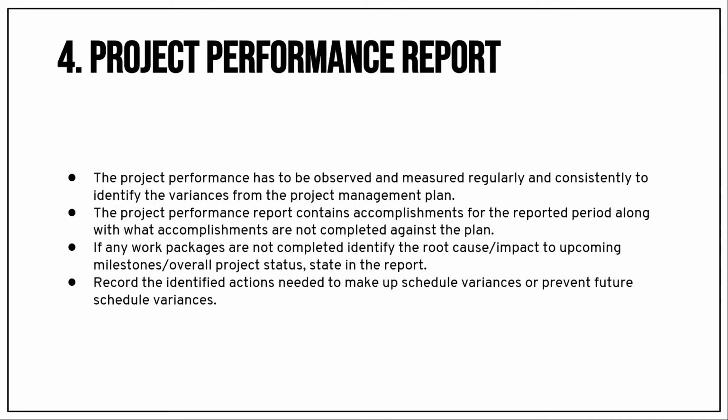Record the identified actions needed to make up the schedule variance or prevent future schedule variance. So like that, as I mentioned, what is the work package we are not delivering as per the plan, and what is the root cause, what is the action identified, how we are going to resolve this issue, and how we are preventing this in the future.